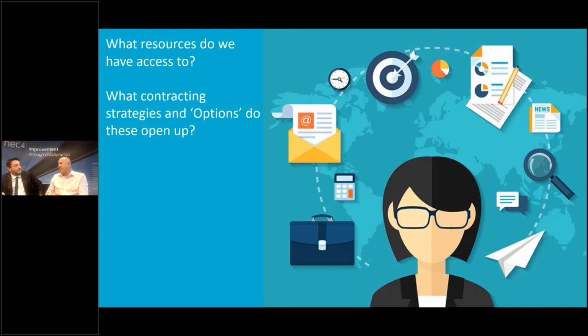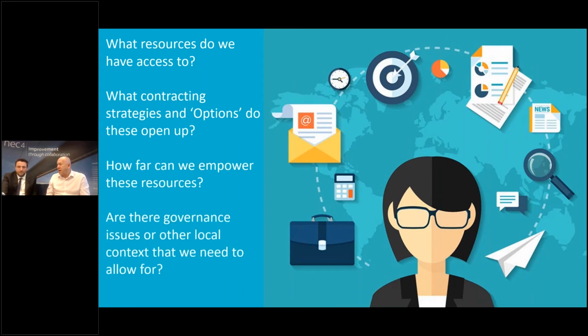So what you're really worried about with A is assessing compensation events, really. B is remeasuring the bill of quantities, different resource again. C, D, and E is now about collecting defined cost in the correct way. Absolutely. And declaring it. All very different skill sets, aren't they? They are. And so, do we have capable resource? Do we have sufficient resource? For option C, D, E, do we have cost engineers, commercial accountants? Is our audit function aligned in terms of expectations to what we're going to do? And what are we going to do with the forecasted defined costs that we're going to see?